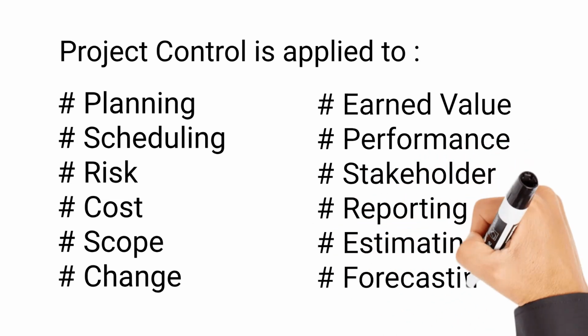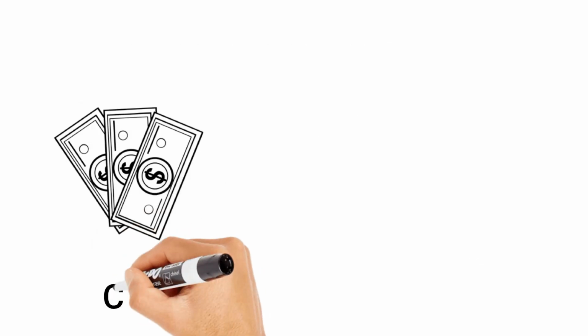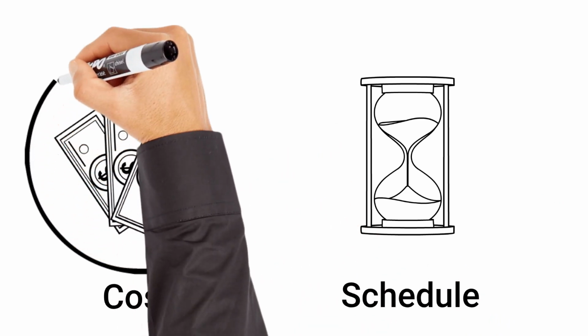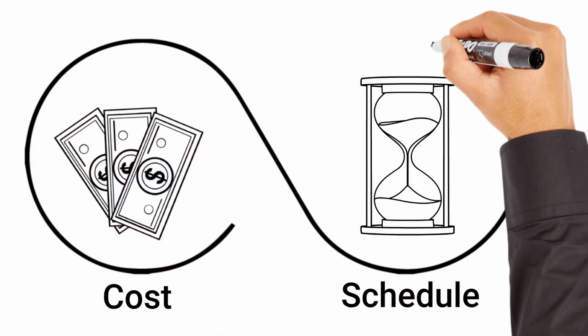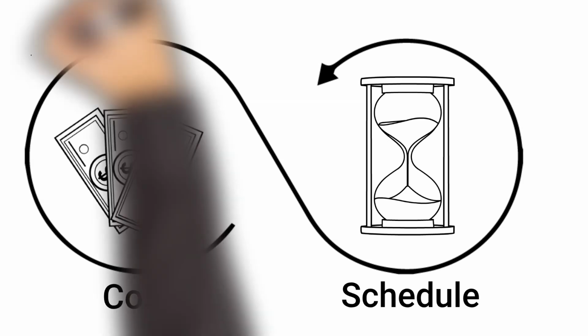The project controlling process group monitors and controls project work, performs integrated change control, validates scope to ensure the deliverable is acceptable, and obtains formal acceptance. Generally speaking, it controls scope, schedule, and costs. Project control makes sure the project delivers what is defined, as per the scope, and meets acceptance criteria. Also, project control ensures that the project deliverables are properly tested and validated, and controls communication.